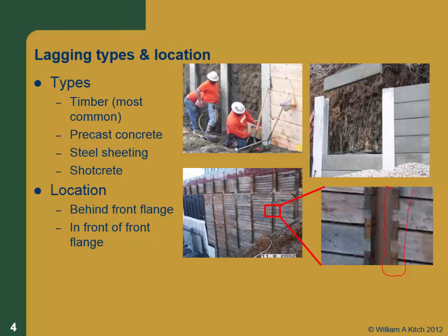I've actually seen ones where there's a plate, a bolt here and a plate that goes across, and actually they lag up two sections at the same time. There's basically a plate that they put on there, and there's a little stud welded onto there, and they bolt it right on. So that's another method. And the third method, this is contrasting the, this is another on the face method.